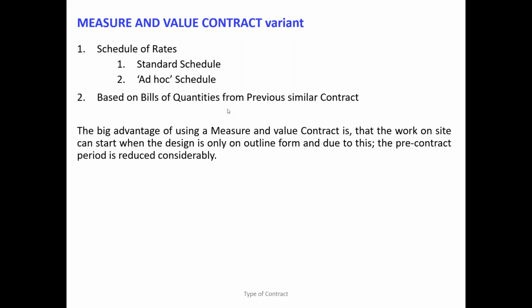And the contractor also wants to get quotations from the supplier. If you go and ask the supplier, give me the floor finishes, these 10 different types, the supplier will get confused. Are you kidding me? You are not going to do all 10 finishes in a simple apartment project. So why should I give you all the rates? Most of the time the supplier will also reject giving the quotation. So what will happen?